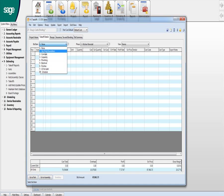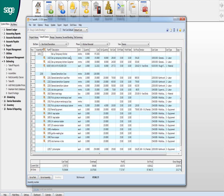And then I have multiple items underneath that. There's site work and demolition that has to be done. You know, set up a temporary kitchen. We figured eight hours. And so what happens here is a lead person, a carpenter and then some plywood. And then we have a demo crew and all of the things they're going to need and the number of man hours.